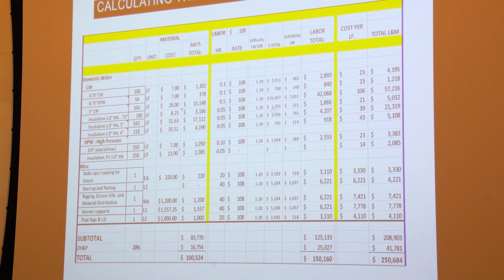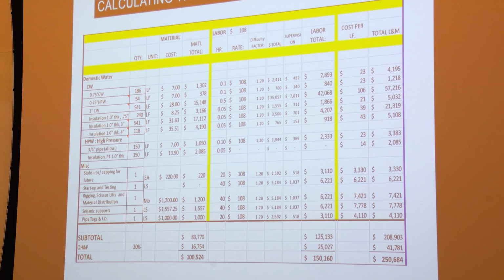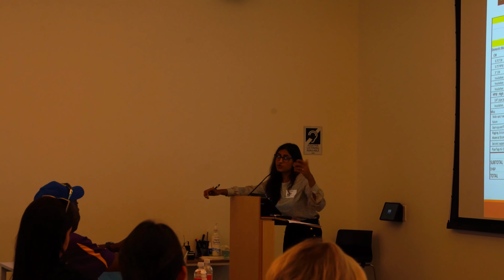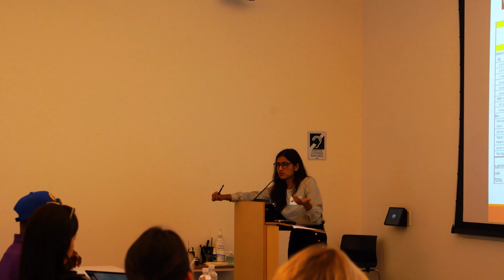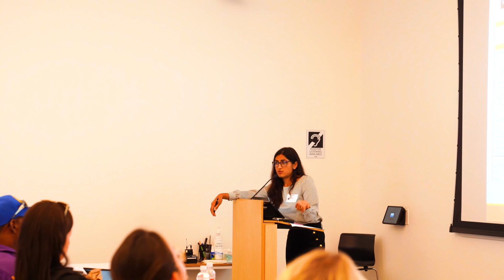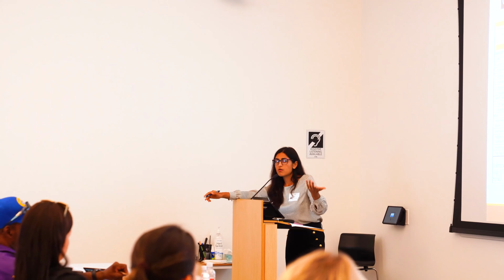Are you working in a crawl space? Are you working in tall ceilings? Are you working in an occupied building where you have to be extra careful of where you're stepping, because you have protections and all those kinds of things? Another thing I should have mentioned initially when you're going over the drawings is, are you working on the weekends? Are you working after hours? Because again, that's labor cost, right?